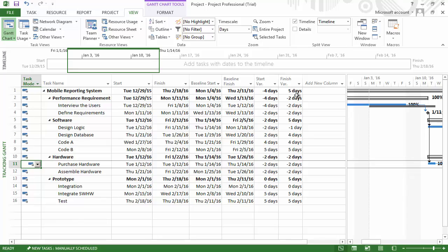The reason for the positive schedule variance is that the work that has been completed ahead of schedule is not critical. How well your project is doing in terms of time depends on how well you're doing on your critical path. It is possible to have a negative schedule variance and actually be ahead of schedule if you are completing critical activities ahead of schedule and it is the non-critical activities that are not going as planned.